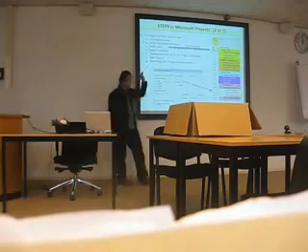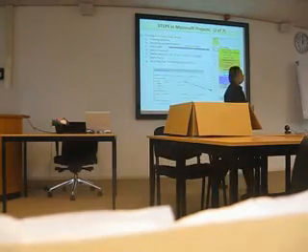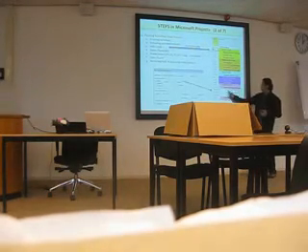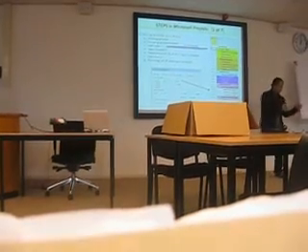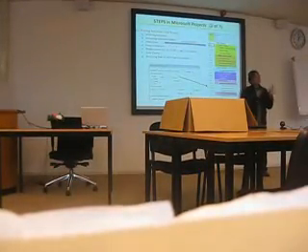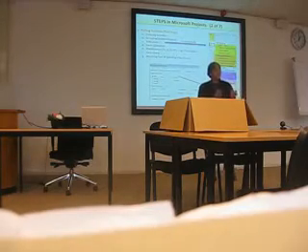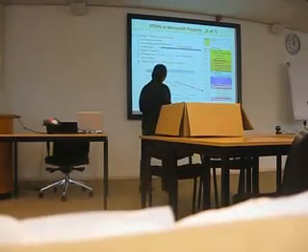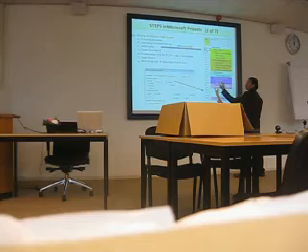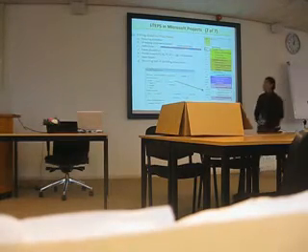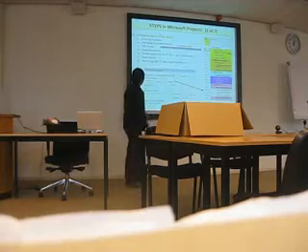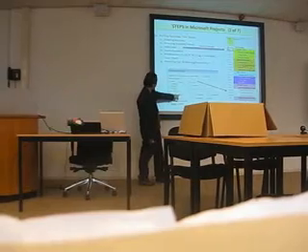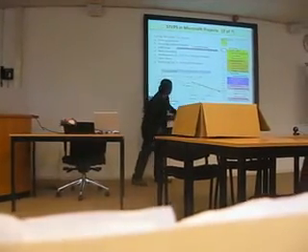We try to use the Microsoft feature, which is the recurring task. We assume that Miss PAM will select three times in a certain period. Let's say she selects a dress pattern one day, and the next day selects another dress pattern, and then the next day again another dress pattern. And then she will choose. This one, we try to use the Microsoft Project feature, recurring tasks, selecting dress patterns. In this one, it is daily, and the duration of the recurring task is the 1st of January up to the 3rd of January.